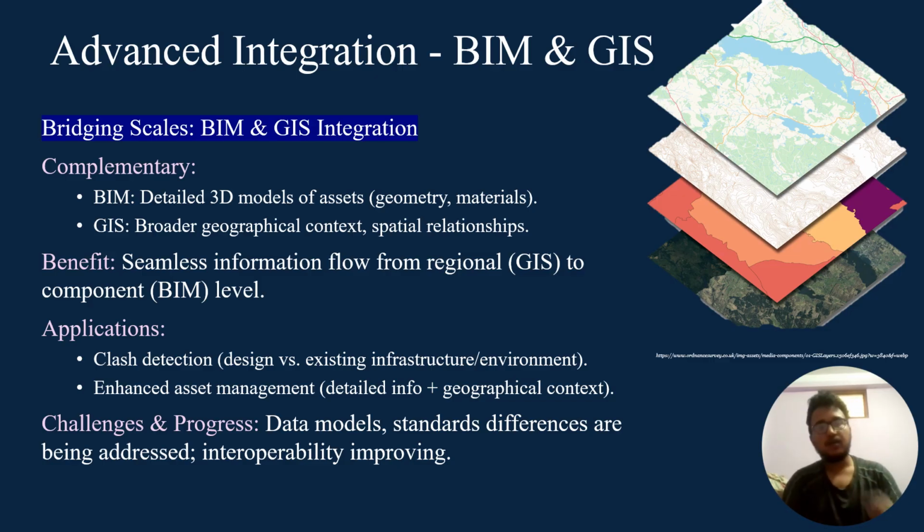This integration allows clash detection between design structures and existing infrastructure or the natural features. So before construction begins, engineers can effectively identify and resolve the potential conflicts between the proposed building elements and, say, underground utilities or adjacent structures or some other environmental constraints.